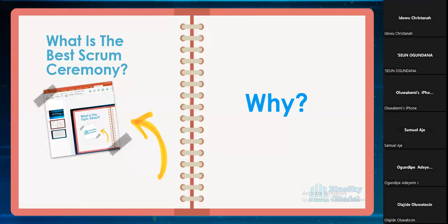You're going to be using 8 hours plus. So the remaining 9 working days should be used fully for development work. If you count 15 minutes every day, multiplied by 10, that's 150 minutes. That's roughly 2.5 hours. So add it. You're using almost 10 hours for ceremonies alone. So you need to be mindful of development work. It's standard, but you can use less. Sometimes, if things don't go right, it can be higher.